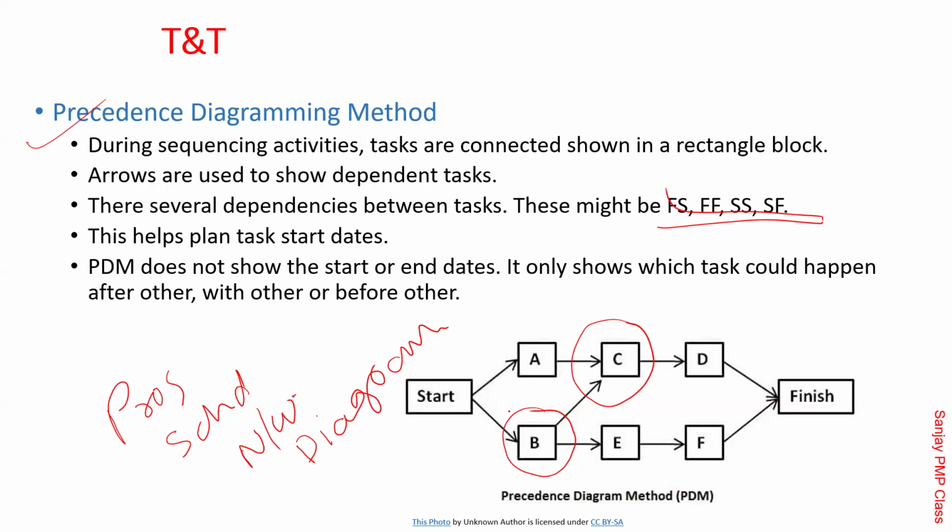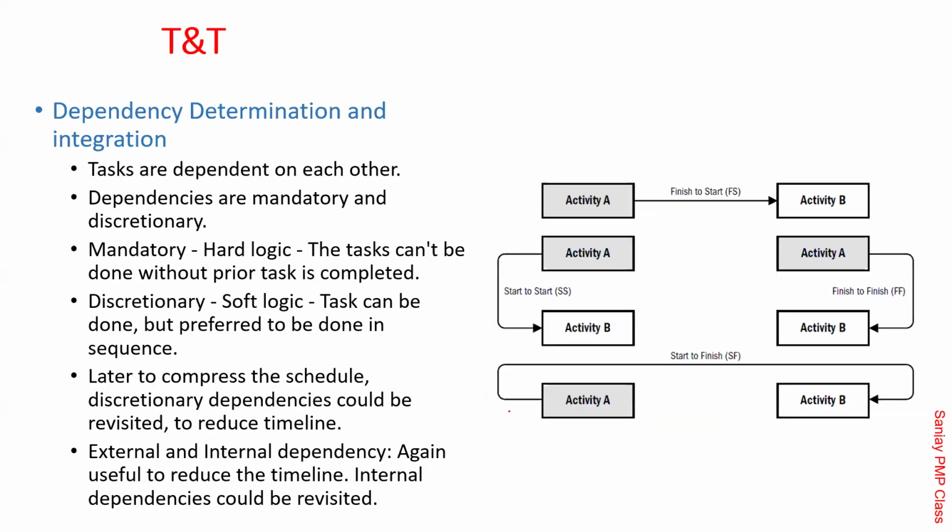If you don't keep a close eye on that, you would probably end up with something which is very rare, but which you assumed is very common, not being available. So the person sits there for a week afterwards. Are you getting this point, friends? That's the importance of path convergence. Similarly, path divergence is also important because this guy might go ahead and stop two routes. That's the reason this theory, path convergence and path divergence, is actually introduced.